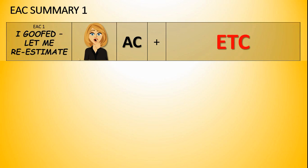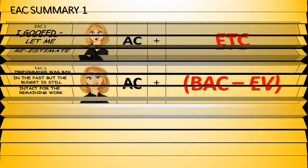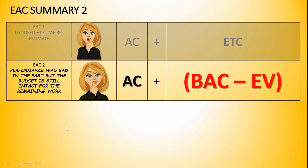Now you know what a bottom-up estimate is. Bottom-up means you're going down to the granular level. You're taking things apart. You're finding resource rate. You're finding out how much the machinery will cost. You're finding out how much the materials will cost. You're doing a total roll-up for whatever estimate you're trying to put together for the entire task array on the project, and you're rolling that up into a final total amount. In other words, you're coming up with a revised estimate. So everything else that you estimated at first makes no sense. It's wrong. So this is going back to the drawing board. So if you really think about it, what do you have here? You have AC plus ETC.